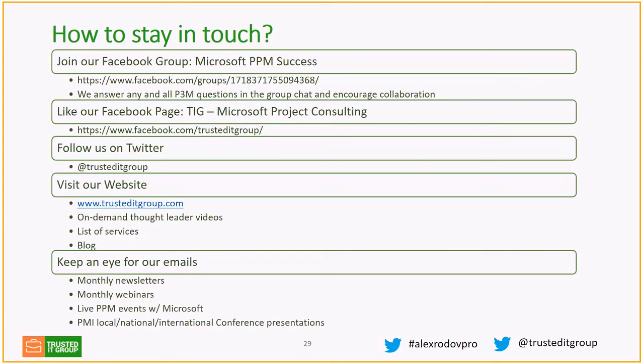So in this case, you need to make this decision up front, in advance, and understand which projects go where, if you decide to map, combine and connect projects to projects or projects to epics. That would drive your data underneath those either projects or epics.